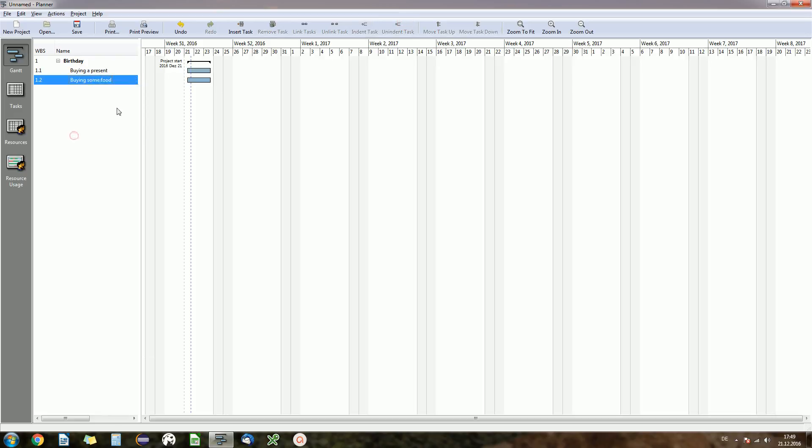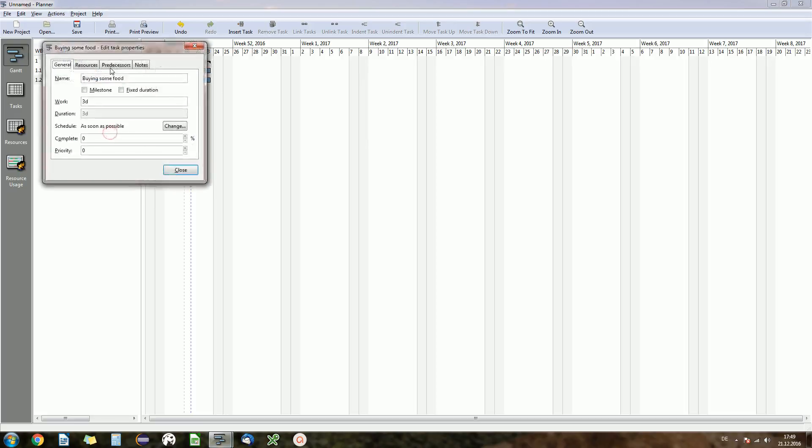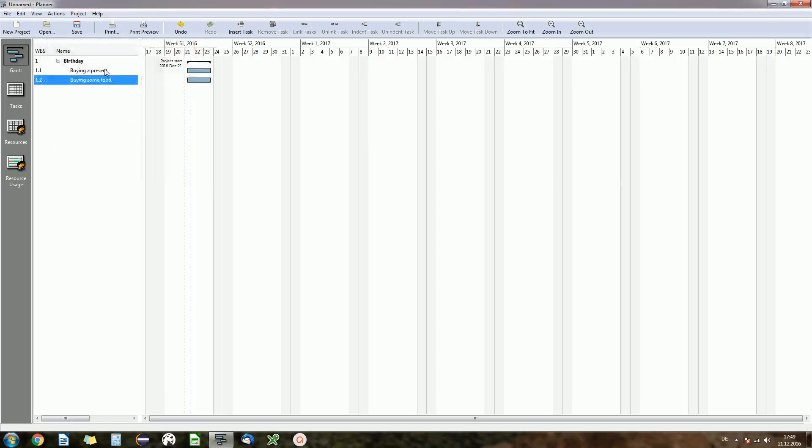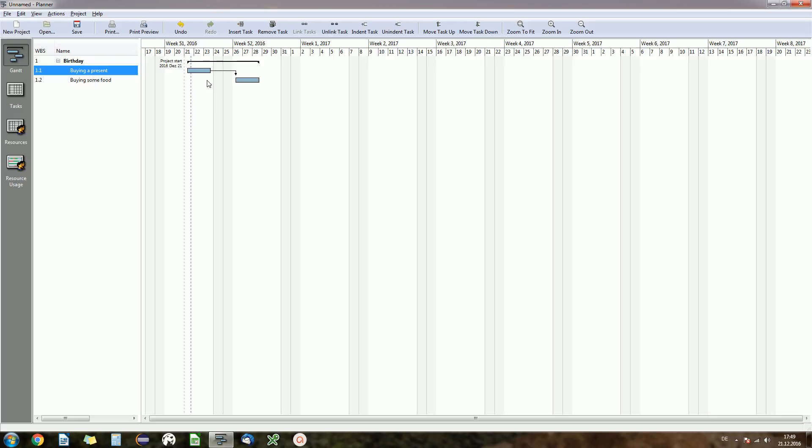We want to link them. What you can also do, what's more handy than always right-clicking and editing, selecting predecessor, is you can select the first one, just drag this one to the second one and then it will automatically connect them.